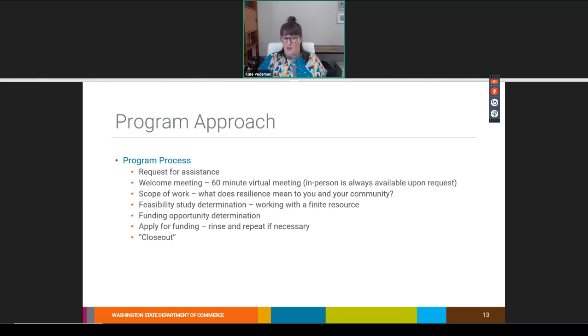We've used a semi-standard process for each community who requests this assistance. The first thing is a community must make a request. This is either through our online request form available on our Solar Plus Storage website or many other ways, like emails or phone calls directly to me. Some came after hearing me speak at a conference, or even others through direct referral from other communities within the program. After that, every community gets a 60-minute virtual meeting.